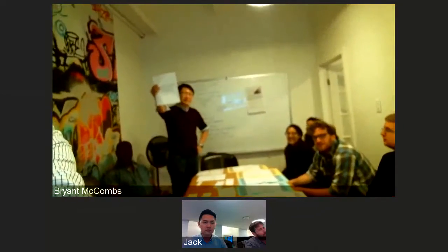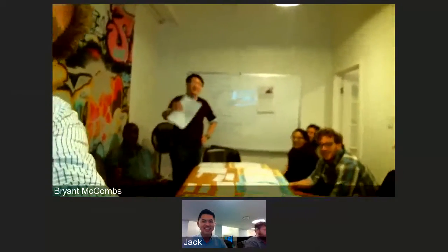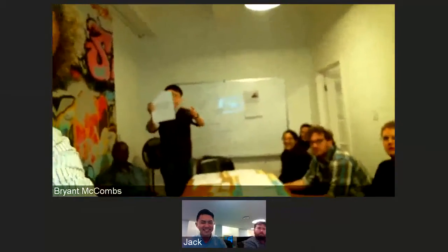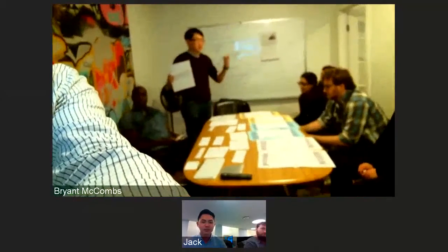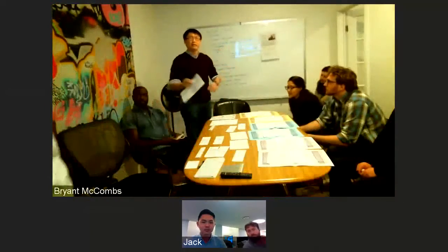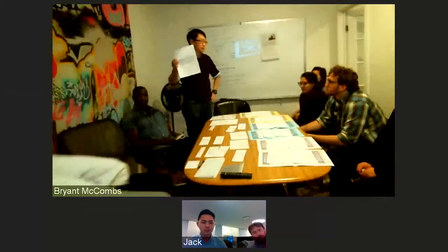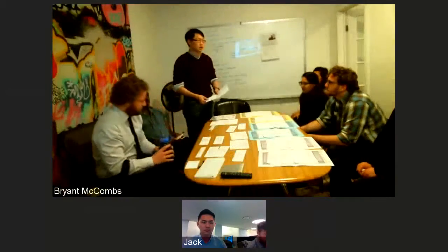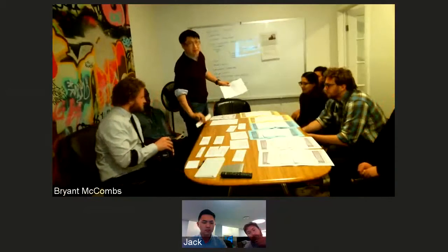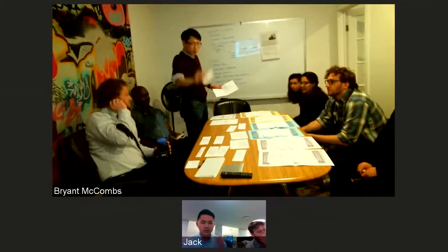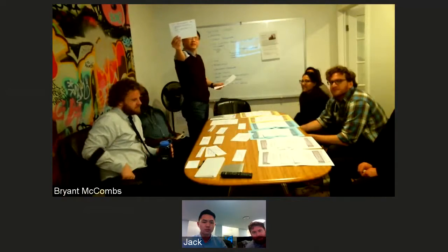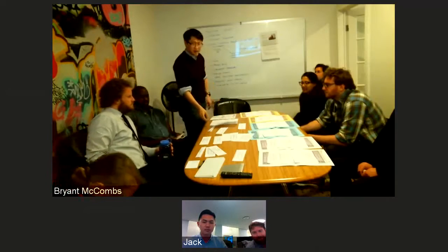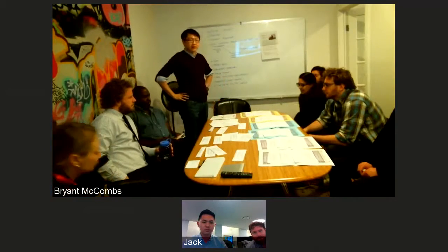Now, this is going to be the most nauseous shaky cam work for this presentation: a 32. That 32 doesn't represent jelly beans or t-shirt sizes or points or what have you. That represents a good faith estimate for hours of work. You might also notice that some of these other ones say 4, 8, or 16. You also might notice that these are folded to various sizes.